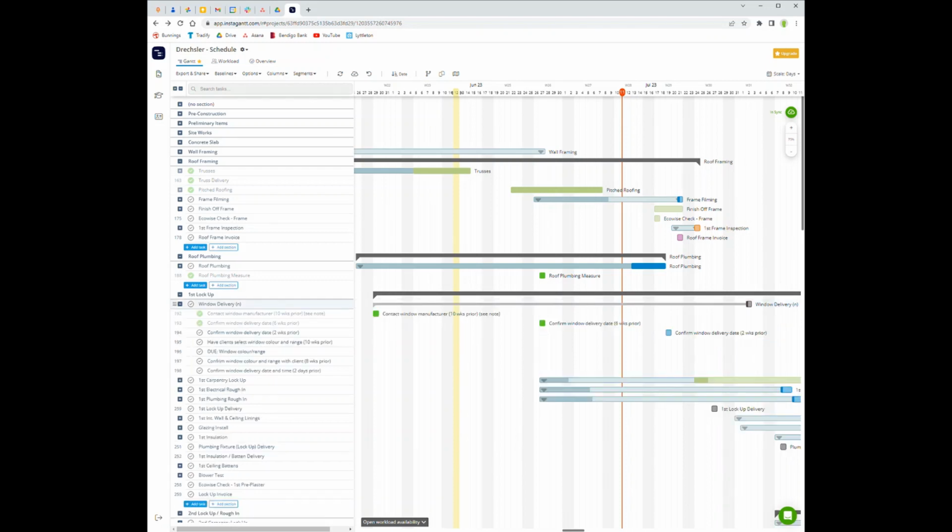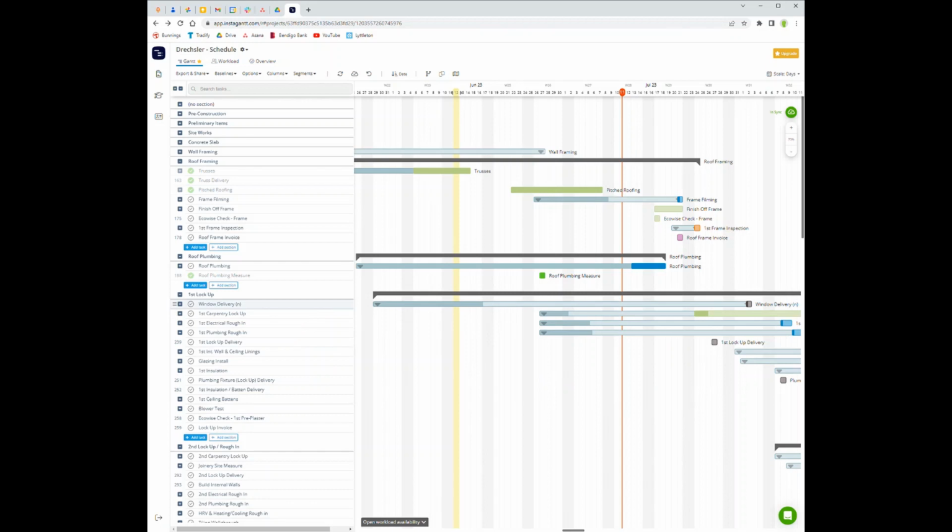But to keep things moving, it only takes the slab prep or framing to be delayed with wet weather and that sort of thing for things to drag out. So to keep the communication going, for a windows supplier, I will touch base with them 10 weeks prior to ordering the windows, and then 6 weeks prior to ordering the windows, touch base again. Hey, just letting you know, 6 weeks away, just a quick email. And then 2 weeks beforehand, hey, just letting you know, I'm all good, ready for that date. How are you guys going? And 9 times out of 10, it works really well.